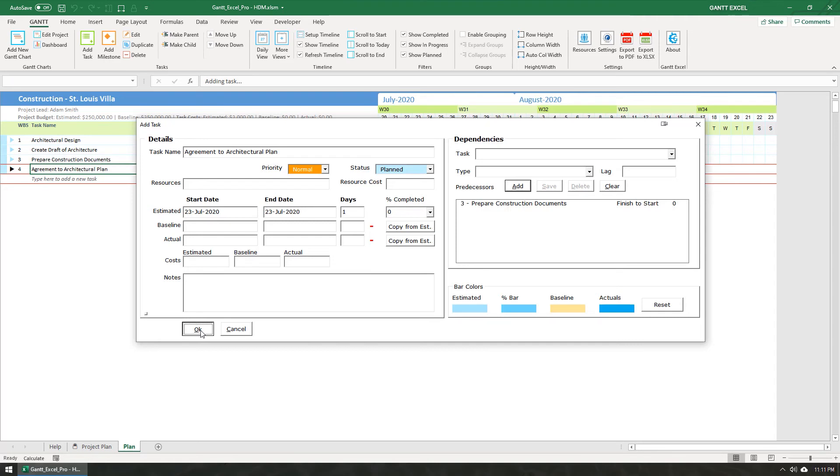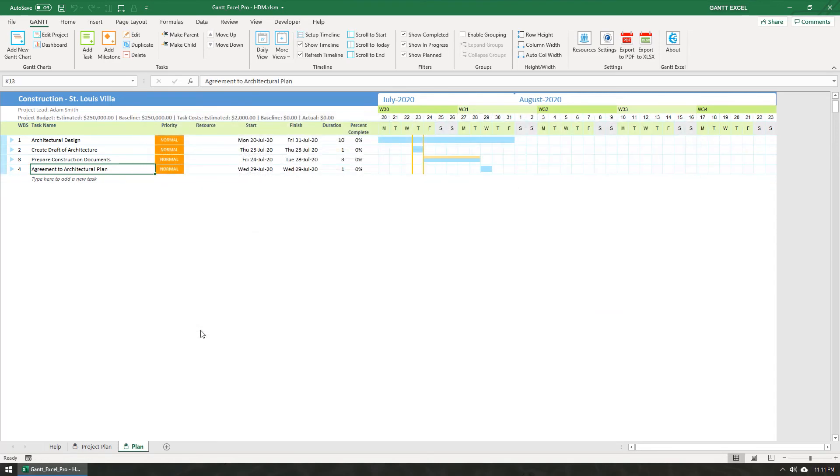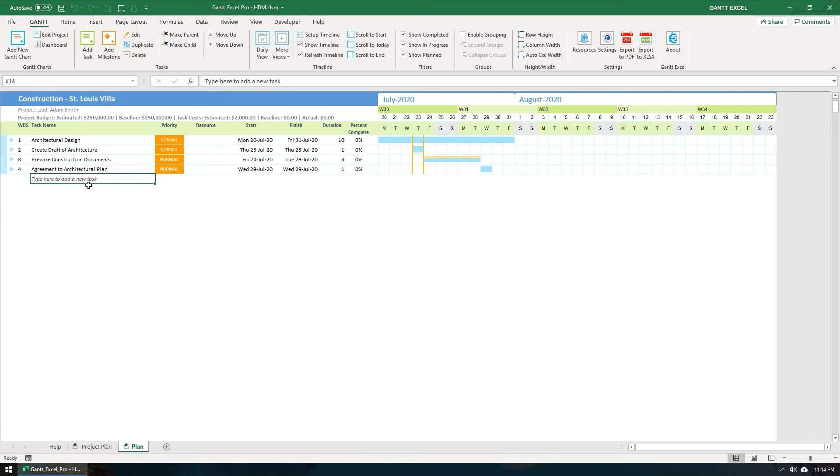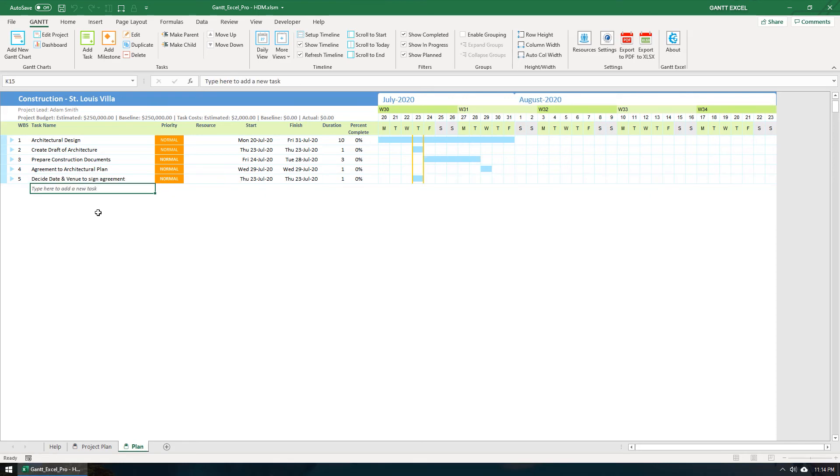Lastly, the fourth and easiest method to add a task is to type in the Task Placeholder cell which reads, Type here to add a new task. I'm going to type, Decide date and venue to sign agreement and hit the Enter key on the keyboard. This action will create a task and set the start and finish dates automatically.